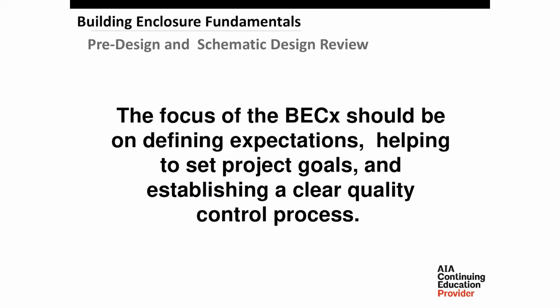So I think that the focus of the building enclosure commissioning provider during pre-design and schematic design should be on defining expectations, helping set project goals, and establishing a clear quality control process. So let's talk a little bit about what I mean by that.